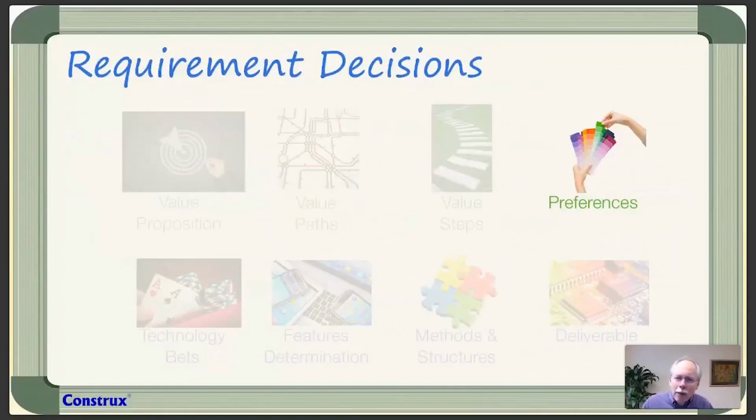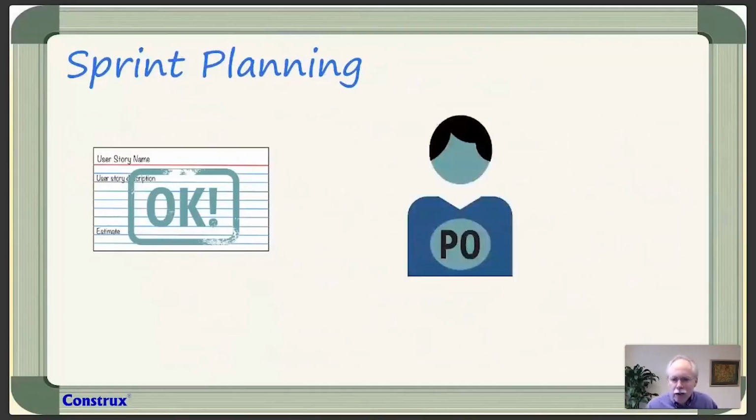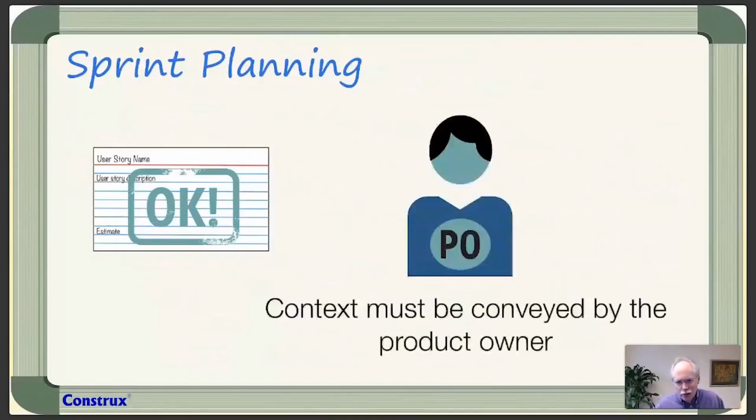Well, we're going to capture those primarily in sprint planning and its follow-on in the daily stand-ups or daily scrums. Because we've taken in that ready story, that story that's ready to go, and we're going to say, hey, product owner, tell us about this. We're going to have them share the context in a conversation with us, because that's where we get the bottom level story.